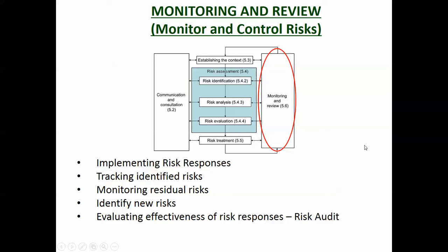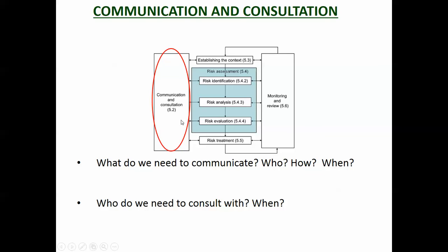So as I said, monitoring and review, you do need to make sure that the risk treatments you've got are effective. So when the project is underway, you're always reviewing it. You're reviewing whether there are new risks as well, and you're undergoing risk treatment. So the risk management process, the risk planning, happens right through the whole project. That risk register is being updated and reviewed every week. And the last thing, communication and review. We communicate with everyone. We make sure that everyone understands what we're doing.